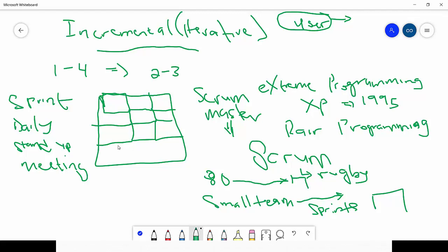What you did the previous day or the previous time you met for the sprint meeting, what you are trying to accomplish presently for that day, and any impediments or anything that might stand as a problem for you not accomplishing what you want to accomplish. Those are the three things that you have to bring to a sprint meeting. So you can see that it's a highly focused meeting that pushes each of the Scrum team towards the goal for that sprint.